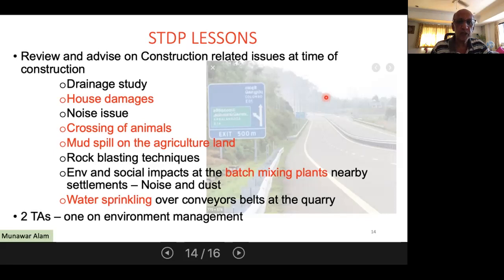People had also complained about noise issues because of the slow progress. We allowed the contractor to work overtime and even at night, but at night, because of the heavy machinery, people complained they could not sleep. So we had to cut down on the time. And where the embankment was so high, and it was an access controlled highway, nobody had thought of giving underpasses so that animals can cross from one side of the highway to the other. Some of the people impacted by the project had land on both sides. So obviously, crossings for animals had to be provided.